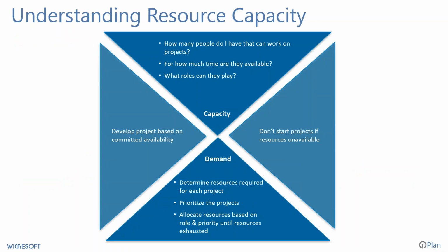Ultimately, in understanding resource capacity, we want to reconcile capacity with demand. We want to make sure that they come as close as we can. We don't want the demand that we take on to greatly exceed the capacity that we have, nor do we want to undershoot the target as well. On the capacity side, we need to determine how many people we have that can do work on projects and how much of their time is available and what roles and skills they can offer and what roles they can play in these projects.